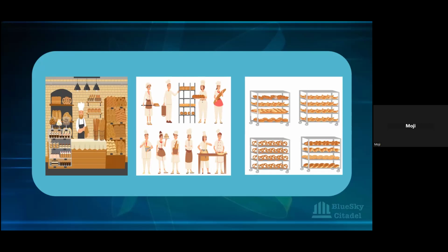You negotiate that, work on the most priority, and then you can even tell the PO that if we have capacity left, if time permits and somebody finishes what they're doing on time, we might think about bringing one of those stories that we've removed back. But for now, this is what it is. Realistically planning, doing your sprint planning once you know your capacity. So this is just to explain what capacity planning is all about in, probably, layman's terms, so that we have a deeper understanding of what we're talking about.